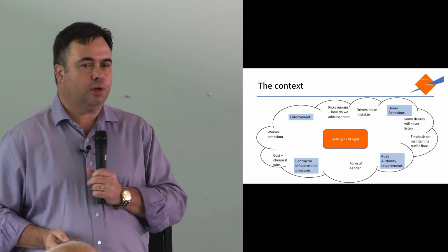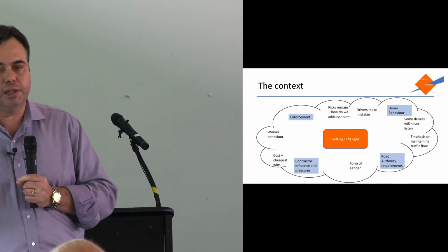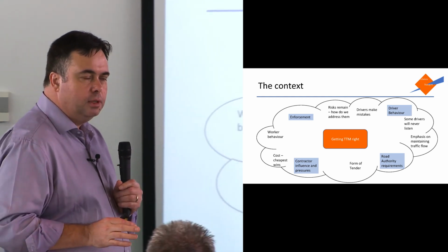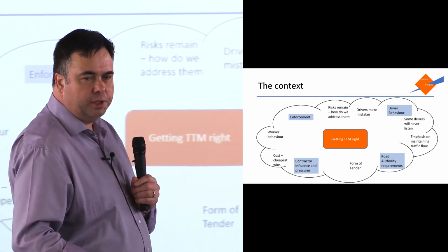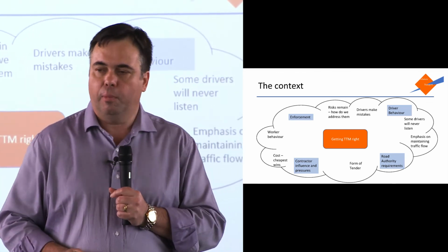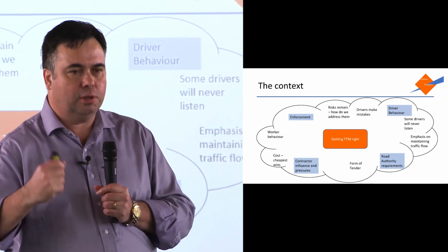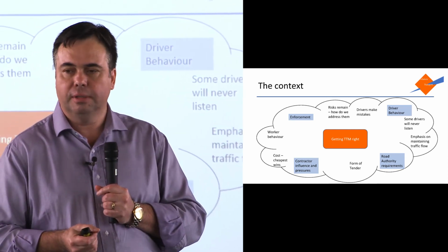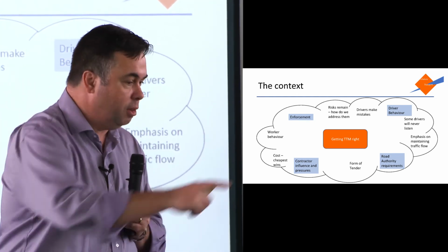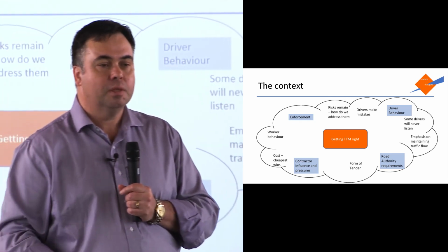You need to look at some of the contractor pressures, and my apologies to any contractors in the room, but I've actually heard stories where contractors tender for a job, a quantity surveyor sits in the office and says, I reckon traffic management will be 3% of the value of this job. They win it, they then go to call sub-consultants to come in and tender for it. They then go, righto, well, you were cheapest, you've got the job, by the way, knock 20% off your price, or we'll go to the next person and ask them to drop.